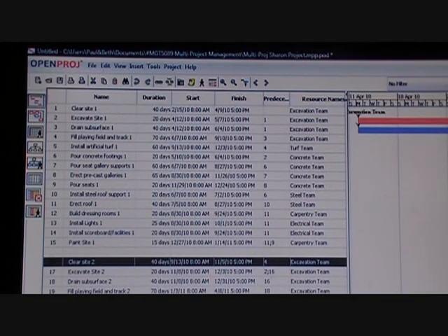As I stated in my paper, the Sharon Construction Company we're going to assume is primarily an excavation team and a concrete team, meaning those are actually owned by the company along with the heavy machinery required to do those tasks, and therefore those are going to be the most critical to us to not have peaks and valleys in their workload and not have gaps in using the machinery and the manpower.